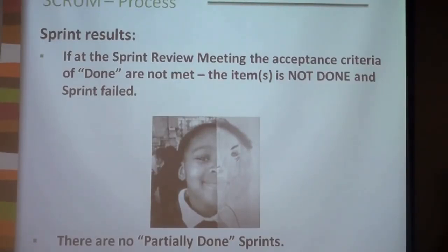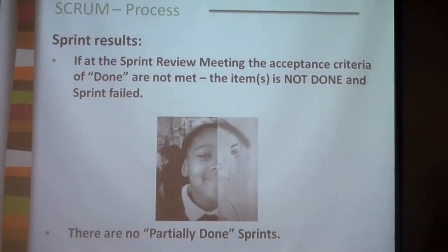So you need to analyze the reasons. Of course, if it was weather or the hardware not arriving in time, and you already have your hardware and do not expect the shower season or rain season to start very soon, then those obstacles you will not have in your next sprint. Then you should probably keep your estimates and planning the way you did in the first sprint. However, if you see that you underestimated, then you should plan more reasonably, right? You should be more careful in your estimates.